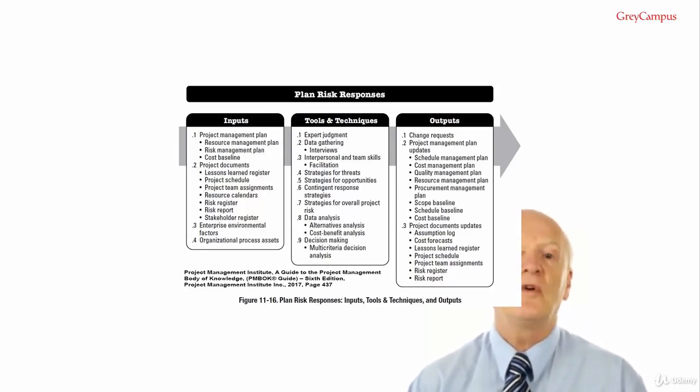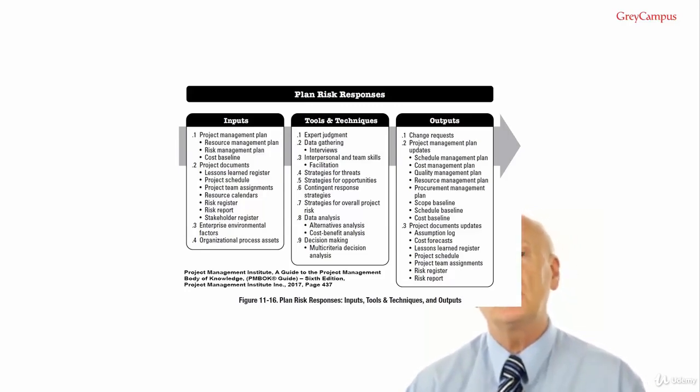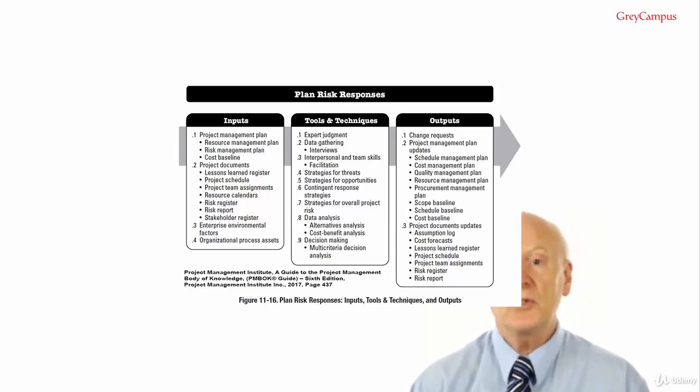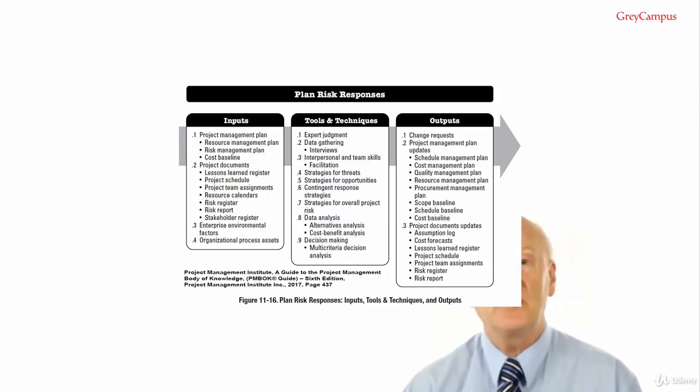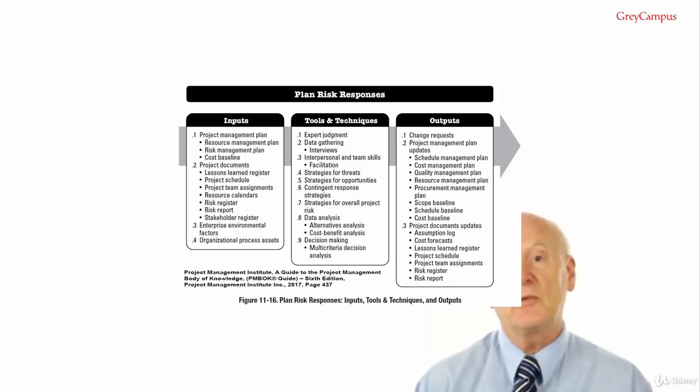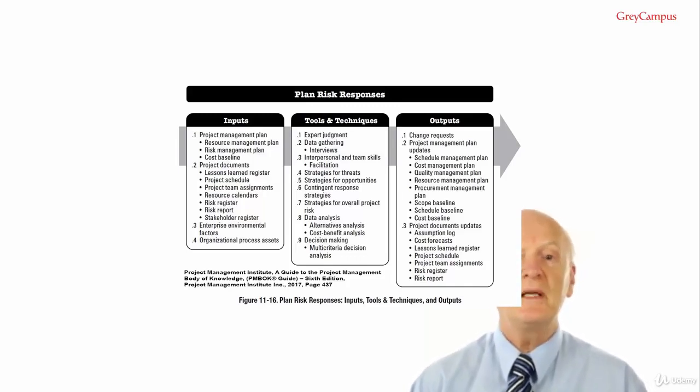An example of avoidance at an overall project risk level would include removal of high-risk elements from the scope of the project. Where it's not possible to bring the project back within the thresholds, the project may be cancelled. This represents the most extreme degree of risk avoidance, and it shouldn't be used unless the overall threat of risk is and will remain unacceptable no matter what you do.